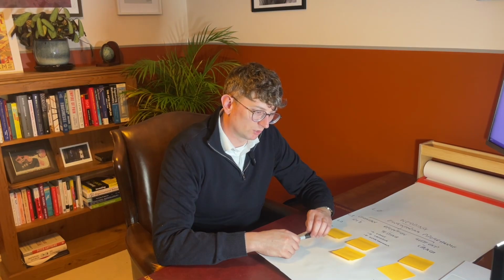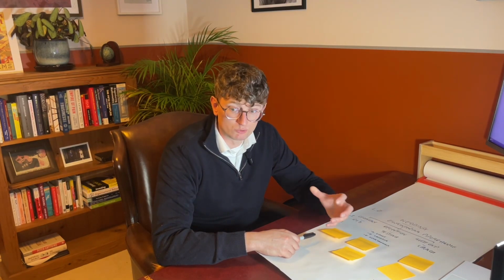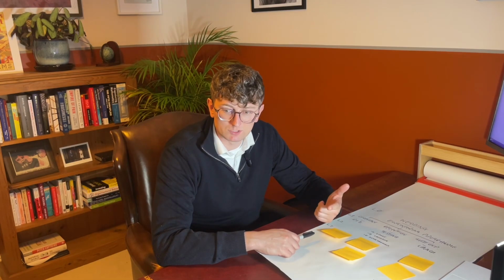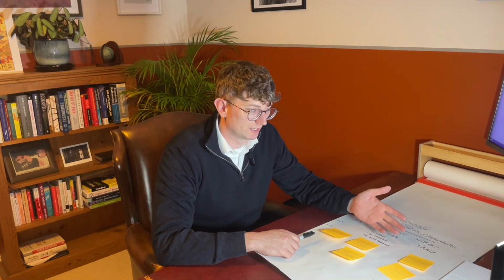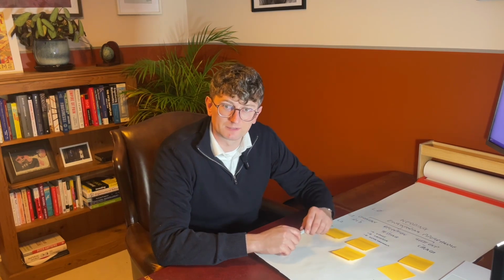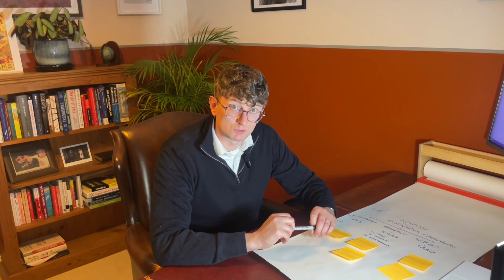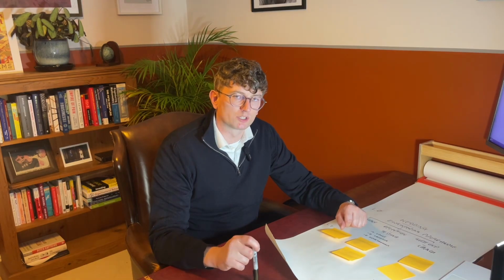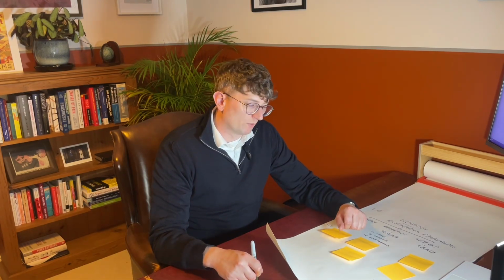Next, we can look at the organizational breakdown structure. Who's responsible for what? A RACI, R-A-C-I: responsible, accountable, who we should consult about it, who should be kept informed about it. This will support our schedule. So when we start to plot when things are going to happen, it'll inform our budget, how much budget we can give to each of these legs, how much it's all going to cost. And when this is solid, everything is going to fall into place. It's going to be a magical moment for you.